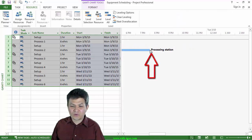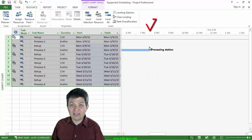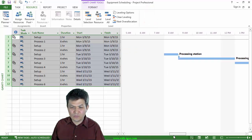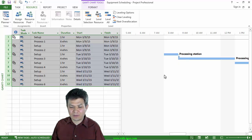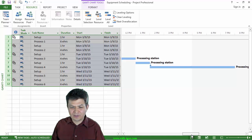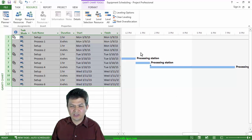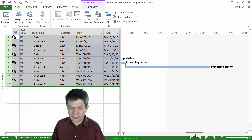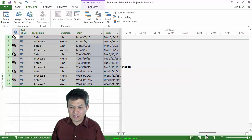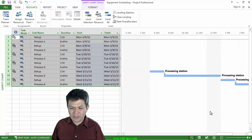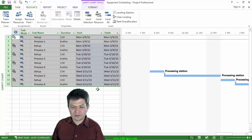But notice, when the process is done, the process is completed, it is actually 8 p.m. So nothing happens after that until the next morning, 8 a.m. And then we do another setup and do a process. And then we have another setup because it's afternoon, and we can do another task, set up another process. But that process is done at 8 p.m. as well. So nothing happens after that until the next morning and so on. So this process works.